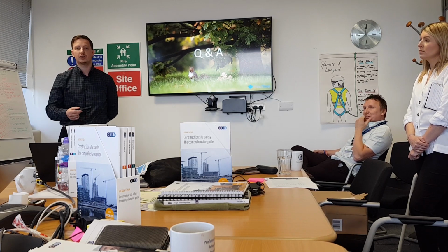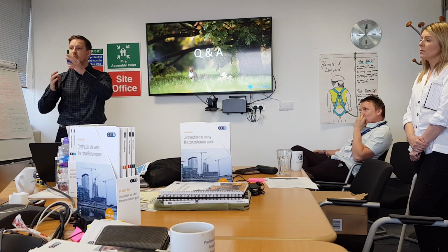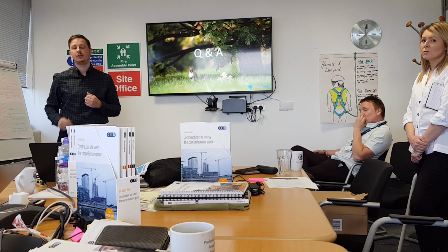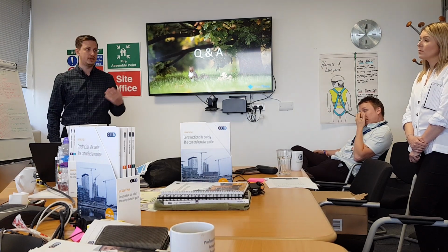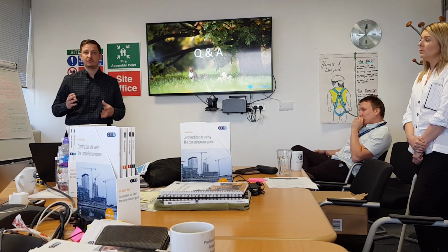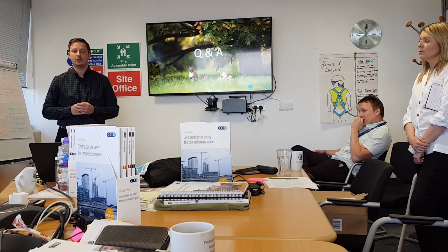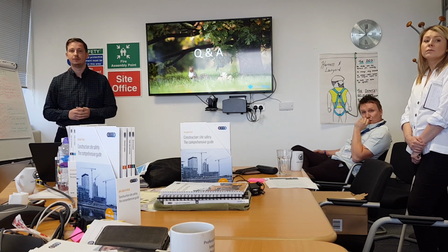It's our only form of exit, and the only reason we've got that exit is we're trying not to put all the traffic onto the school road. We're trying to reduce the amount of traffic going there. So we've made an exit onto Brambley Road. We've spoken to the council, and they're very happy with us doing that, and happy that we're taking traffic away. So that traffic control will be in place in the hours of 8 till 5:30. Does that answer the question?